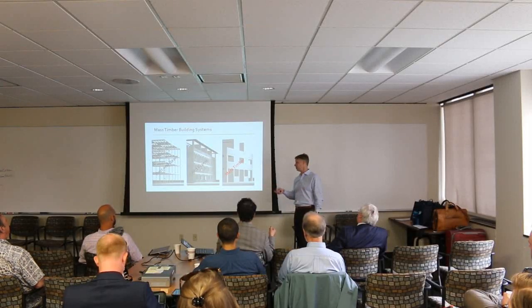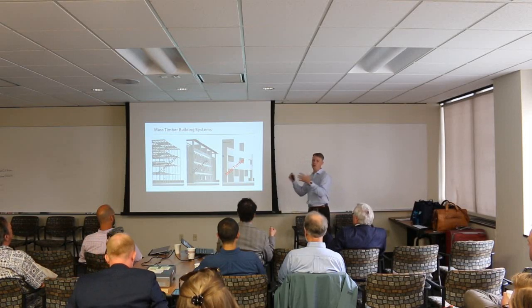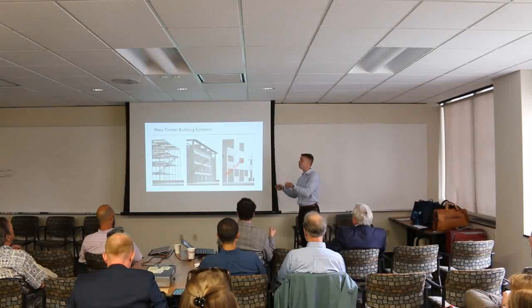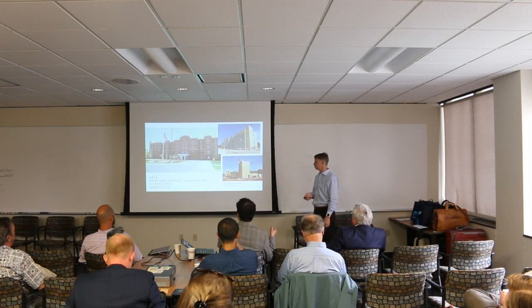walls. If you're going to sit there and you're blowing a floor in 3 hours, and then you're going to spend 2 weeks framing up a wall, it doesn't make sense. So we're offsite panelizing the stick frame walls, bring those in, that speed of construction plays to CLT's speed of construction story. So we're kind of doing a hybrid of these three systems.